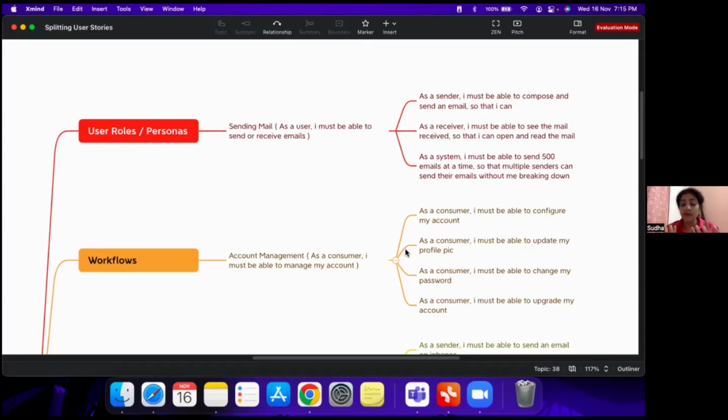The advantage of splitting this is instead of taking the entire story and leading it to failure, you are prioritizing between these 2 stories. One is the spike story and the other is the actual story. Once you find answers, and you have bandwidth and feel it can be completed within a sprint, you pull it into the current sprint, or your product owner may choose to have the actual functionality story in the next sprint. If you have unknowns, the same approach can be used. Do a POC. So have a story for a POC, and the actual implementation of the functionality can be another story as well. So this is another way of splitting the stories.